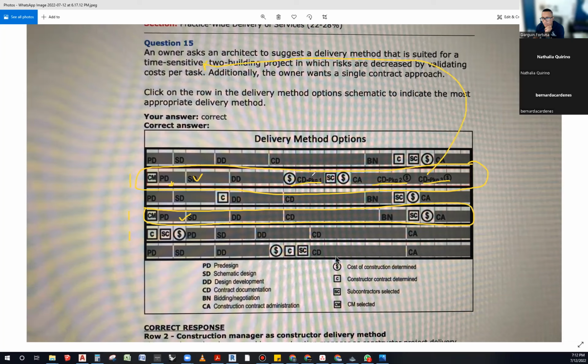You can begin doing foundations and the building hasn't even been finished. The design hasn't even been finished. Then you can do the core or whatever, exterior, and then you can do all the detailing, right? So the only one that's plausible on the time one is that one. And let's see what the correct answer is. Anybody has any questions? It doesn't make sense? Do you guys agree?